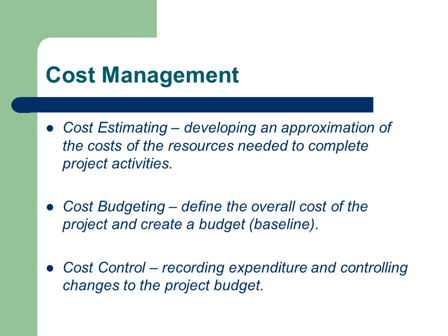Cost management. Cost management includes processes required to identify, analyze and refine project costs to produce an overall cost estimate. This is then broken down over time intervals to create a budget. Project expenditure can then be monitored and controlled by comparing actual expenditure against the budget. Cost management is also critical to the success of the project, and it is the responsibility of every team member, not just the project manager.